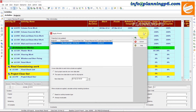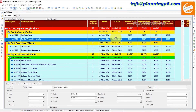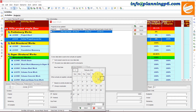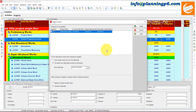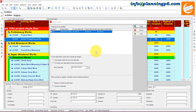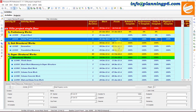The project finish date is 22nd of February. Go to Tools > Apply Actuals, change the date to 22nd of February, select it, and apply. You can see a warning: 'New data date is greater than the current date — are you sure you want to apply the actuals as a future data date?' Yes, I am sure, because it is a planned date.